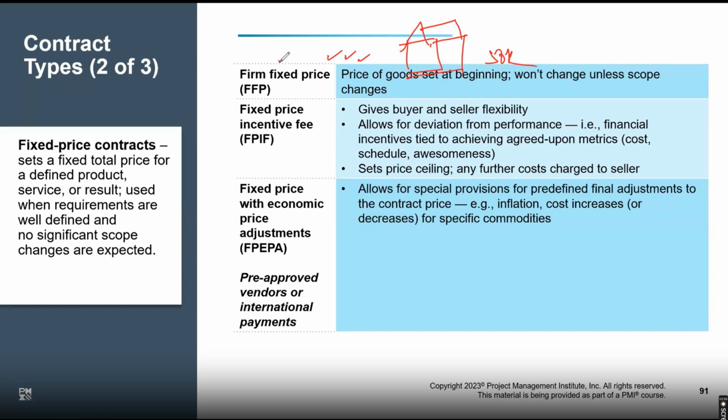Everything, raw material, vendors, procurement, all the payments have to be done by the company, the sponsor itself. The vendor pays nothing from the pocket, and there is a fixed lump sum fee. This is what will be charged. And yes, you get extra money. If I ask for an extra garage, then you tell me, okay, there's 5,000 extra for that. So this is simply the professional fee we are charging here. That's my pure profit, and I'm not paying anything. So much better. What's the fun of first spending from your pocket and getting the money back? Practically much better. At least you're not paying from your pocket.